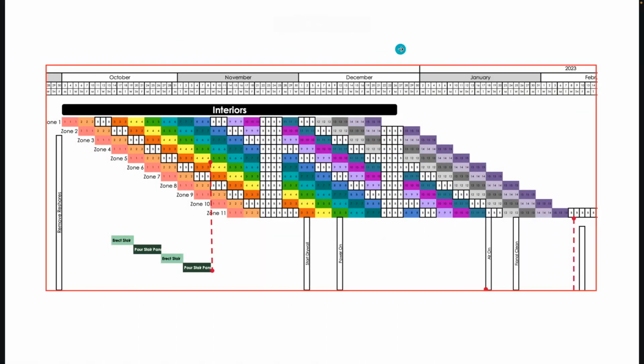In this video, we're going to cover some different concepts in relation to buffers and why we should have them. So in this opening slide, I want to show you a norm level schedule for the example that we've been using and show that during holidays and throughout the sequences and at the end, we should always have buffers in our Takt plans. And that's because the focus of Takt as a nimble system is to be able to absorb delays and variation so that you can still finish your projects on time. And it's a normal part of the system. Every schedule and construction should have buffers. So let me take you through this video.